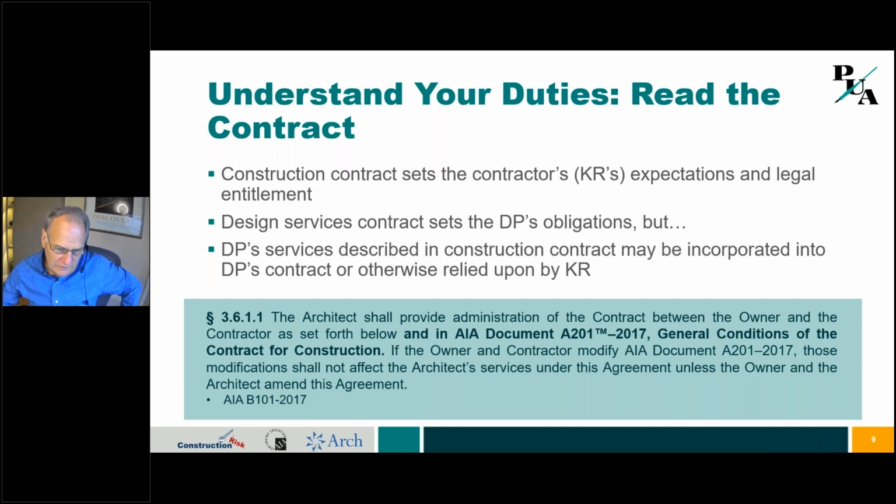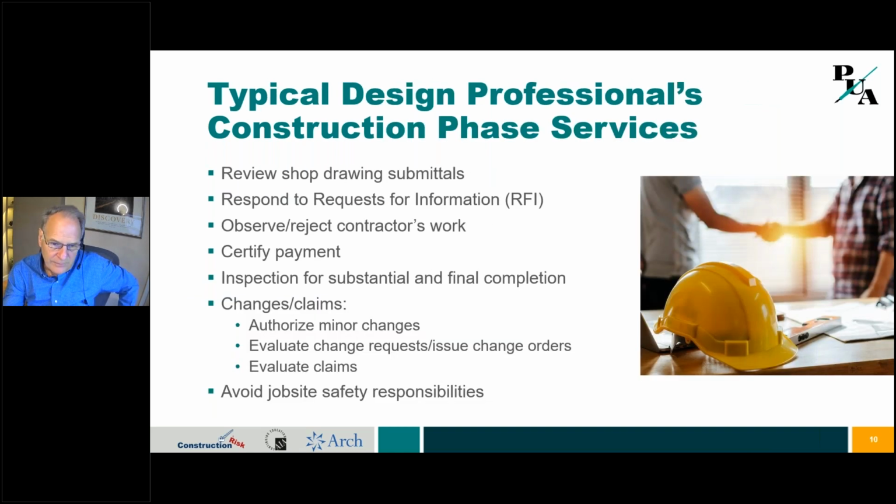Okay, next. Typical design professional construction phase services include your shop drawing submittal review. You're looking at RFIs. You're observing and monitoring the contractor's work, and do you need to reject that, or do you have the authority to reject it? You're going to be certifying payment. You're inspecting the project for substantial and final completion. And then there are change orders and claims that are coming in from the contractor. You have a job as sort of an independent moderator to look at those changes and make an evaluation of those. And so you need to be careful how you're doing that.